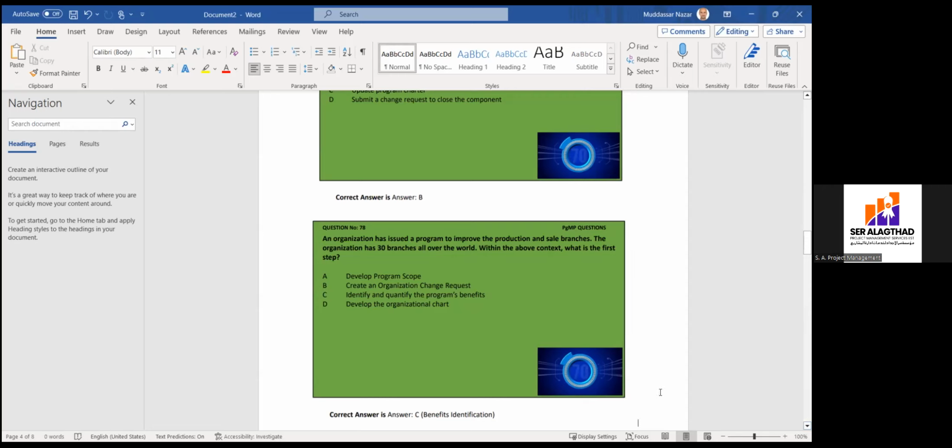If we say that you have done the initial cost estimation and you have the cost estimates already available, what is the next step to do? Master budget. Then we have to make the budget, because if we are in the cost domain, the answer cannot be WBS or master schedule; it has to be the budget. So this table that I prepared is very important.